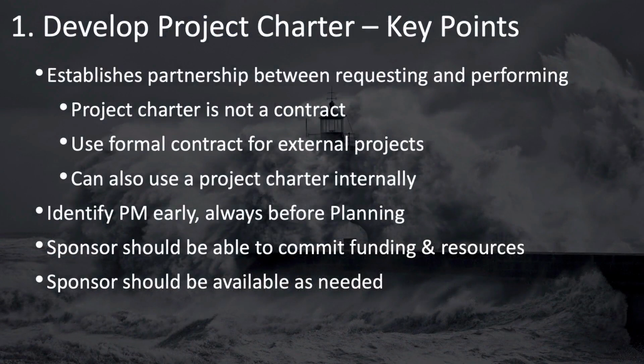Some key points to remember about the Develop Project Charter process are that the project charter establishes a partnership between the requesting and performing organizations. The project charter is not a contract. A contract is something that involves consideration, usually payment in exchange for goods or services. You use a formal contract for external projects, but not for internal projects.